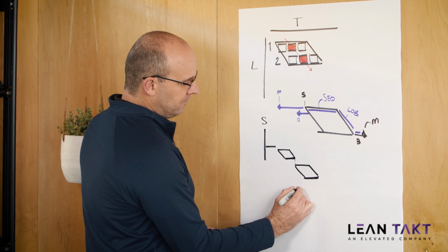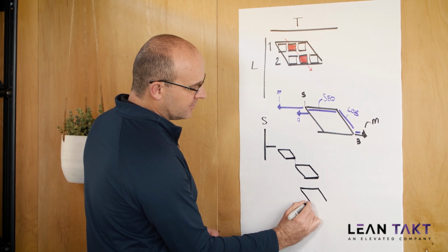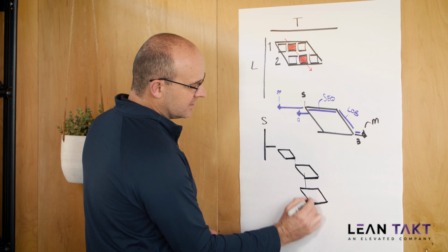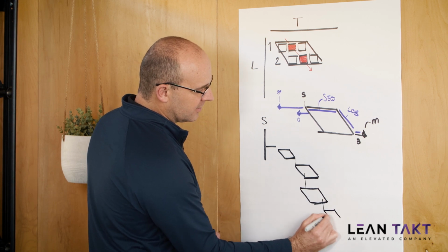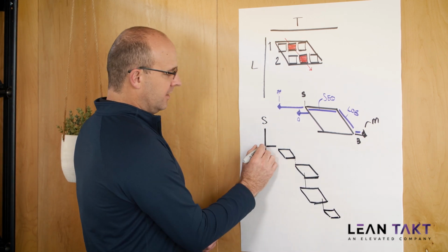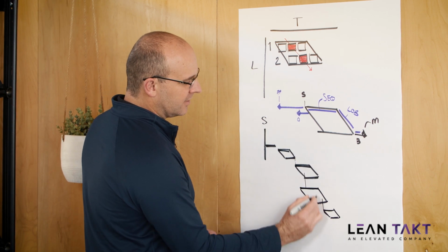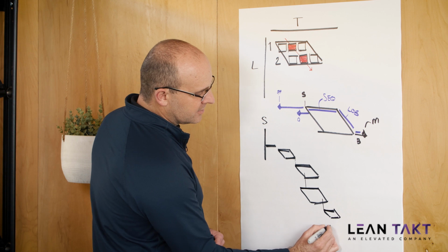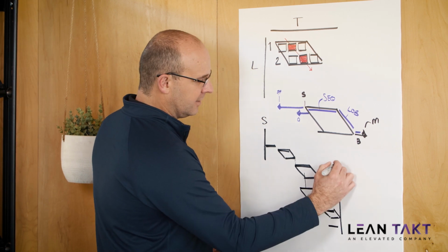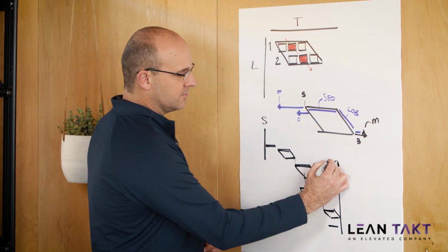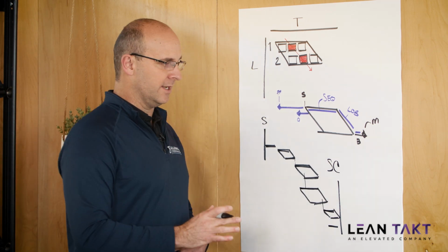So let's say that we have multiple phases. I'll start to sketch this out and say, all right, I think this is what it looks like from the foundations and make ready to the superstructure to the exterior, interiors, closeout and commissioning, site work. And this is when I think we can complete the project. This is when my substantial completion will be.